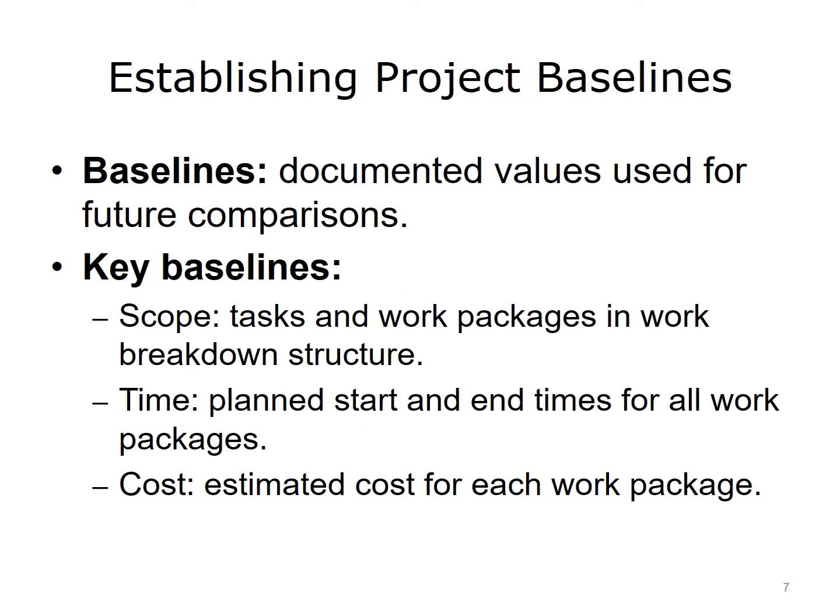Establishing baselines will help you manage those project constraints. Baselines are documented values that can be used as reference points for future comparisons. You will use your WBS to organize your baselines. In terms of scope, your baseline will include the tasks and activities in each element of the WBS. For the time baseline, you will determine not only the start and end dates for your entire project, but for the individual work packages. You will establish the deadlines for deliverables and key events.